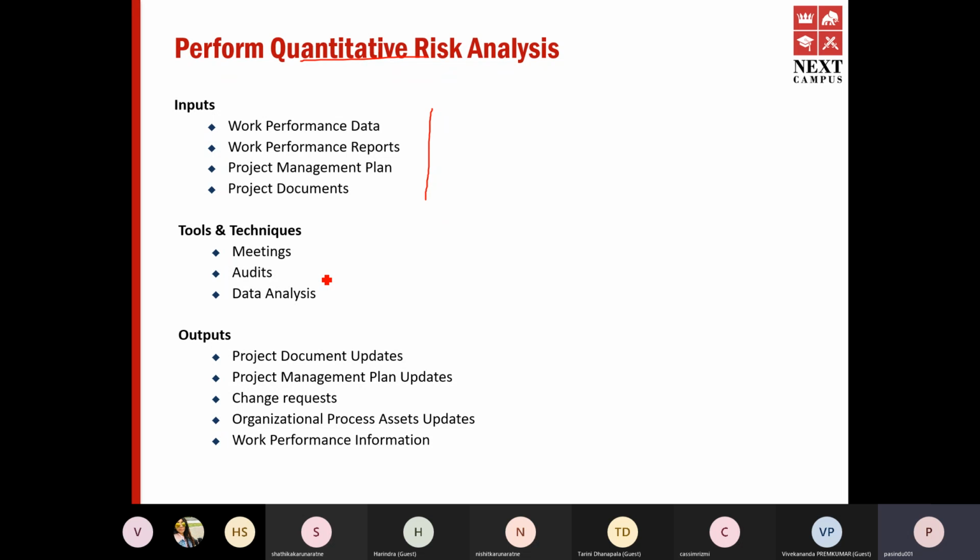When I did the initial planning, I realized two major risks. One with regard to the resources, because Fiori was relatively new, and we did not have a lot of people who were experts in Fiori within that organization, within MAS. So that's one risk I realized. Second risk is with regard to the technology.